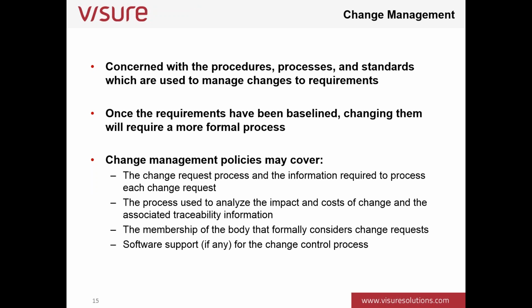Okay, we have already defined the change management for requirements. It's concerned with the procedure, process, and standards we use to manage change in the requirements. Okay. Basically, once the requirements have been baseline, changing then will require a more formal process. That will depend on the process we are adopting, depend on the company policies and any other factors, but basically we won't be able to just go to the requirements, modify the requirements and keep working.